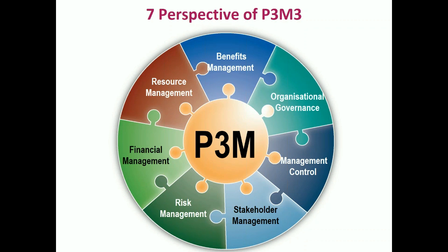Which brings me round to the top of the tree, the benefits management. The difference, I would say, between benefits management at project level and program level. At project level, it's what is it that you are delivering. You're the project manager, you deliver it, you tie it in a bow, you give it to your project sponsor along with your post-project report, walk away, and that is done. At program level, benefits management is that enduring piece of the benefits realization. Are you continuing to be on track with what was promised in the business case?